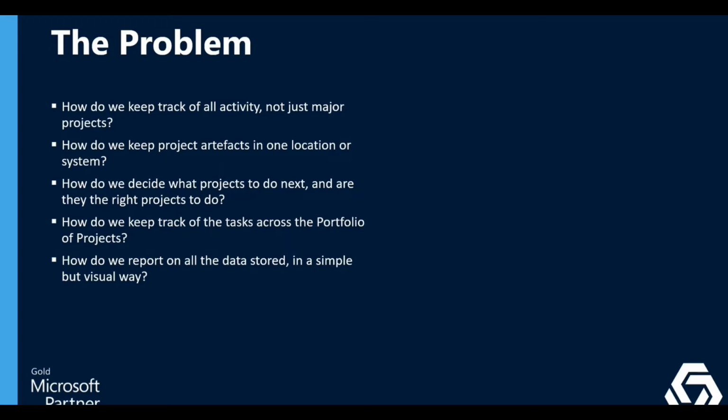Another problem for me was reporting. I remember when I was 20 years old doing a PowerPoint presentation, presenting to a senior executive committee at Dŵr Cymru Welsh Water, and I'm copying all my risks from my spreadsheets and pasting them into a PowerPoint document, PDFing the document and coloring the boxes in red, amber, and green. And the amount of human error, you could check it once, you could check it twice, you still go up and present it to the portfolio board, and you'd get one of the RAGs wrong, or one of the logical things would be wrong, or you'd mis-enter the risks into the system. And most importantly, the data was probably 2 weeks old by the time you're presenting it.